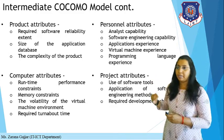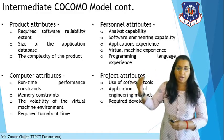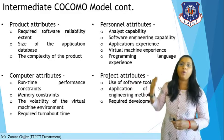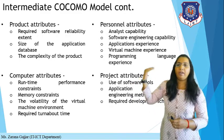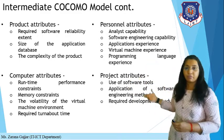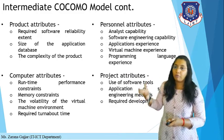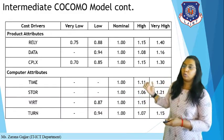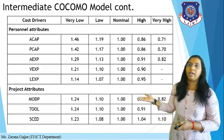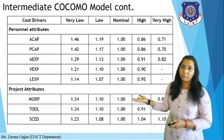Each and every parameter has a range from very low to very high — very low, low, nominal, high, and very high. Each of the 15 parameters has a unique, predefined value. These cover the product attributes, computer attributes, personal attributes, and project attributes.